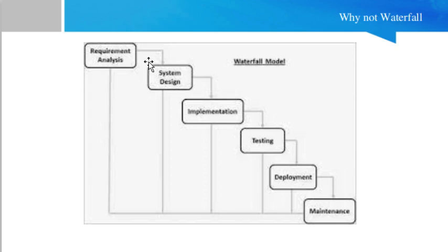So the approach of waterfall is very rigid from the customer's point of view, because once the project is initiated, the customer is not so aware of what he actually wants as a requirement. So the rigidness and strictness in the waterfall model is not acceptable, not likable by the customer. Why? Because if the customer wants to make any changes in the system, he must go through a change request, and it also requires additional money, additional cost and additional time for the development team as well. So friends, these are a few disadvantages of the waterfall approach.